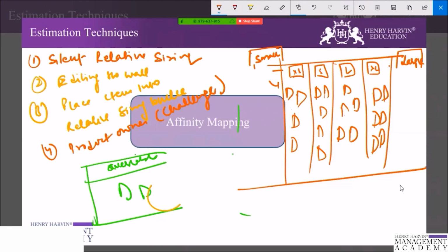So the team discusses their reason for the size associated with each item, and you can take multiple approaches in terms of challenging size based on the team input. So when a team member decides that an item should be resized, put it onto a separate wall for resizing after the challenge has completed, and have team members decide on the spot with the product owner what the new size is going to be. Although the first of these choices seems best, I have also found the second is sufficient in most circumstances.